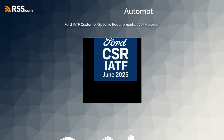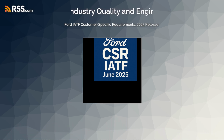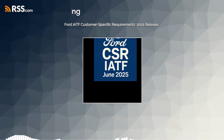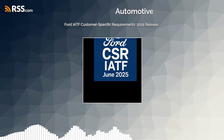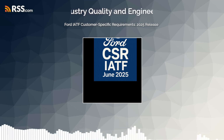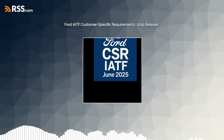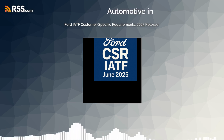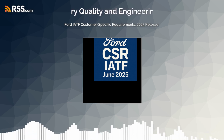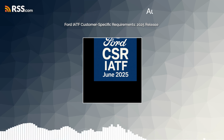The document mentions the Statement of Work, or SOW. What's the deal there? Yes, the Statement of Work is a critical document. There can be different types: an engineering SOW, an assembly SOW, a manufacturing SOW, depending on what the supplier is providing and involved in. The core requirement here is that organizations must meet the requirements specified in their applicable SOW. And importantly, they must ensure their planning and execution align with GPDS timing, Ford's Global Product Development System, timing and milestones. So, connecting their work back to the bigger Ford product plan? Exactly. It ties the supplier's detailed operational planning directly into Ford's overall vehicle or product development lifecycle. You have to hit your marks on their schedule.